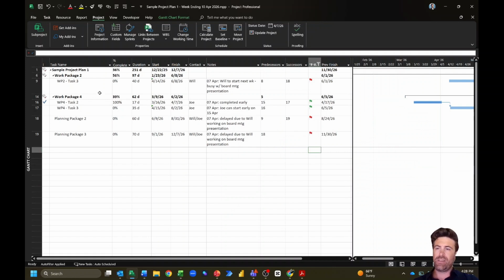So once I do that, you can see here that the only tasks that are showing up now are the tasks in which the finish date has changed, right? So pretty quickly here, just by adding this custom field, we were able to get to the point where we can visually pick out what changed in that meeting that we just held with our team, which is going to be super helpful when we're trying to communicate with them, right?